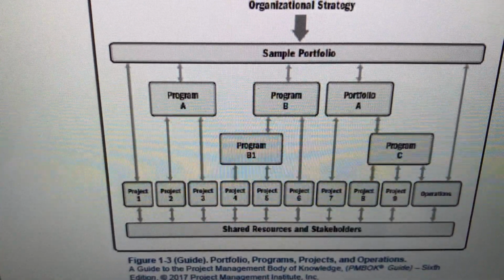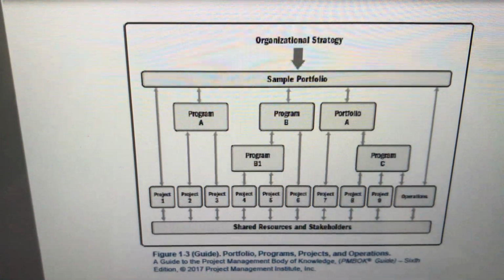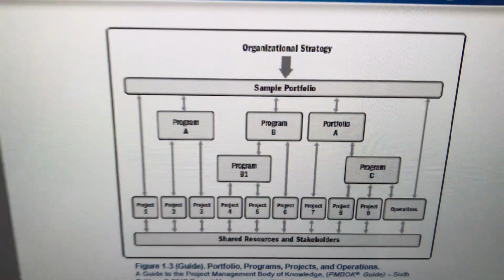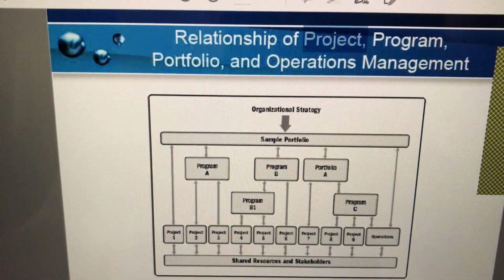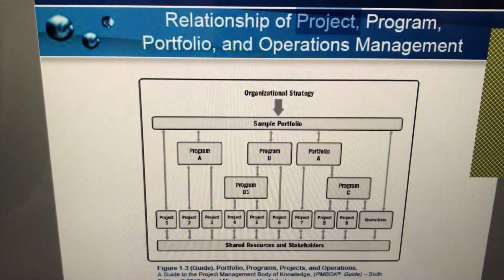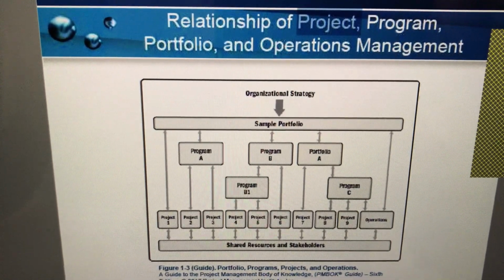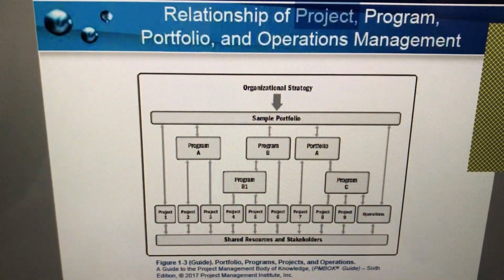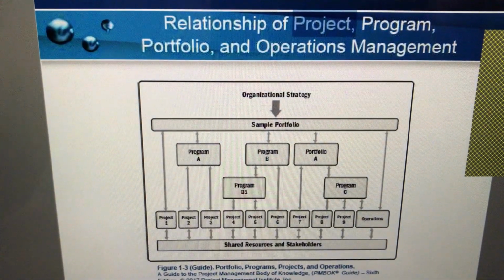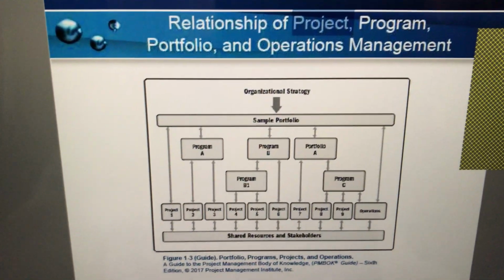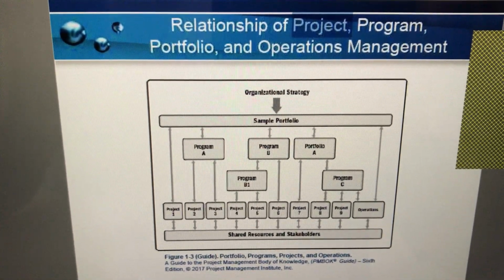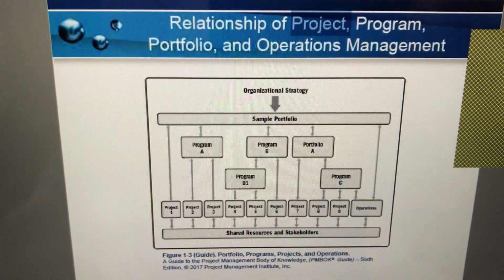What if the government imposes certain restrictions on liquor? What are the harmful effects on the society? Are there activists in the market who will stop, who will agitate? Several things are done as part of market research, scenario planning, brainstorming, and then a range can be put. Oh, I would expect what is the revenue dollars. The revenue dollars is a key driver to your go or no go decision on the project. If it is not making a positive business case, that means if the returns are lesser than the investment, it's clearly a no go.